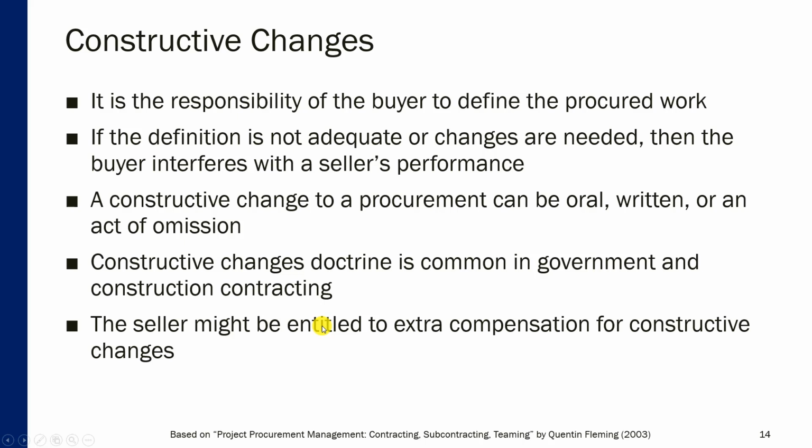Now there's another legal concept of constructive change, and this is something that is intimately related to change management. It is the responsibility of the buyer to define the procured work to the seller. If the definition is not adequate or changes are needed from the buyer's side, then the buyer interferes with the seller's performance. So the constructive changes doctrine or concept is all about that: under what conditions a buyer has the right to intervene in seller's performance, and what is the fair compensation for the seller if that intervention happens.